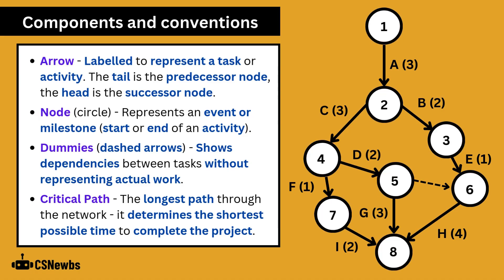In this example activity A, which might be to gather requirements, starts at node 1, which may represent the beginning of the project. The three denotes three days will be allotted to the task and upon completion of activity A, the head of the arrow represents the project will now be at node 2, which could be a milestone titled requirements gathered.